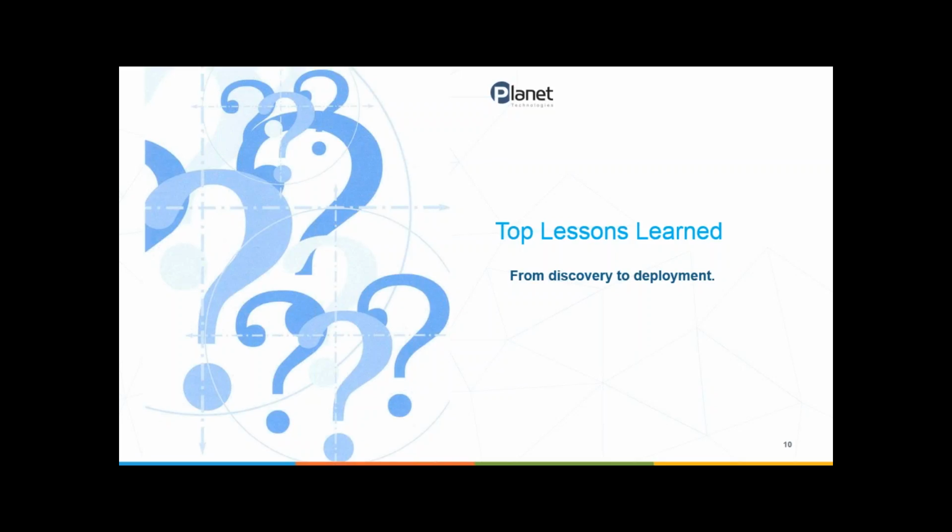Ryan, how about you? Any lessons learned that you can think of that you want to share with the folks out there? Yeah, one of the things that we really ran into on the deployment that I'm currently working on is they just use primarily MAK keys for their Office activation, and KMS is a lot easier when you're doing these, but the one that we're doing is an in-place upgrade. So we had a lot of challenges importing the MAK keys to activate Office, because it just did not work how you would expect in the in-place upgrade scenario.